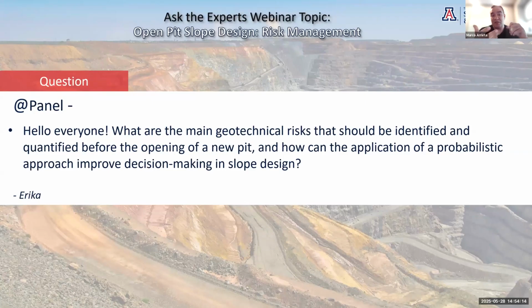So your risk assessment needs to be split in 2. If you're opening the pit, make sure that your people are safe on your daily basis. So that is rockfall. From a strategic point of view, make sure that you identify the interaction between your shell and your structure, and you identify in the planning space which hazard is going to become important, and through time, when they are going to be present, and how much time do you have to address it.